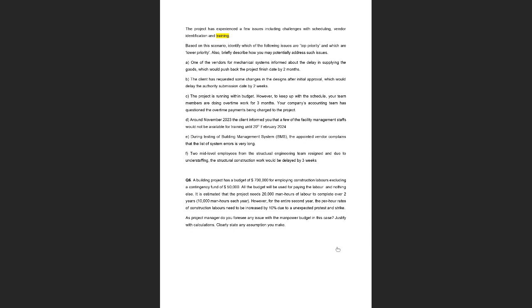So what happens in the next year? In the next year, there was a 10% increase. That's why I asked you to find the per hour rates, because for the second year, we are going to increase the per hour rates by 10%. So what happens when there is a 10% increase in $35? How much is it going to be for the second year? It's 38.5, right? For the first year, we have 350,000, and for the second year, our per hour rate has increased to 38.5.